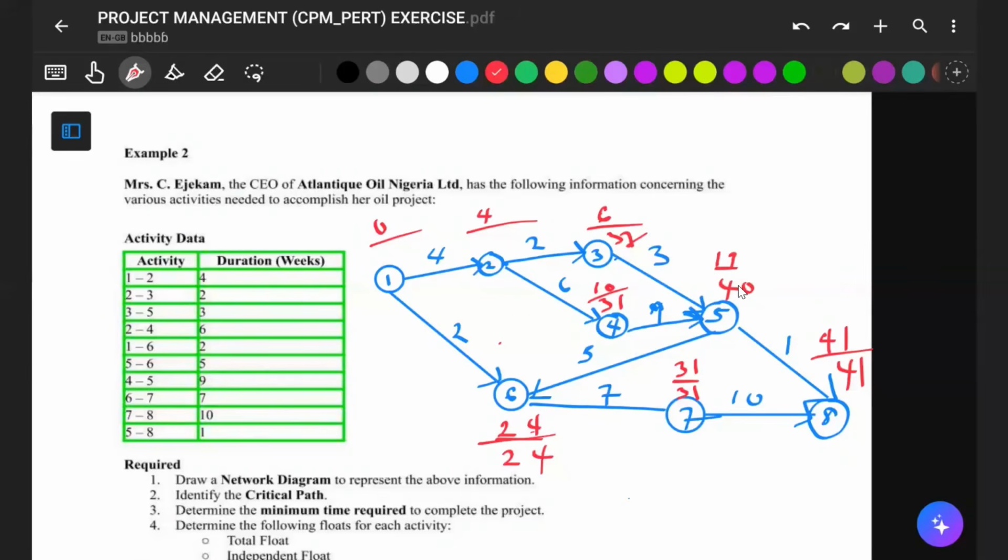All right. Going back, you consider the lesser figure. I said that last time. Yes, going back is the lesser figure. Going forward is the higher figure. All right, so that's out of the way. I will still be watching. I might still do another one because I want you to figure it out as well.